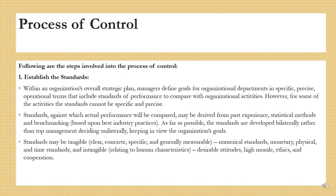The process of control. There are certain steps which we have to follow in order to exercise control. The first is establishing the standards. We would be establishing what kind of standards are there against which we would be comparing our actual performance. Within an organization's overall strategic plan, managers define goals for organizational departments in specific, precise operational terms that include standards of performance. Standards against which actual performance will be compared may be derived from past experience, statistical methods, benchmarking, or based upon best industry practices.